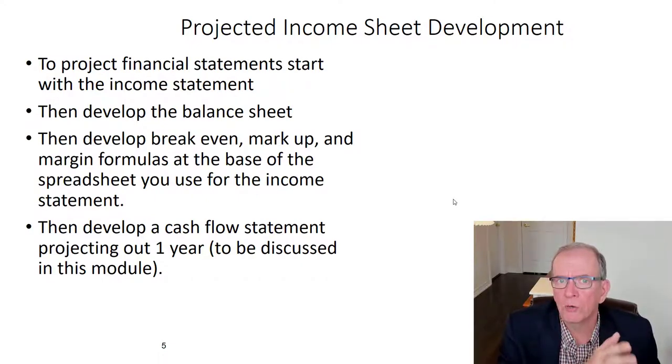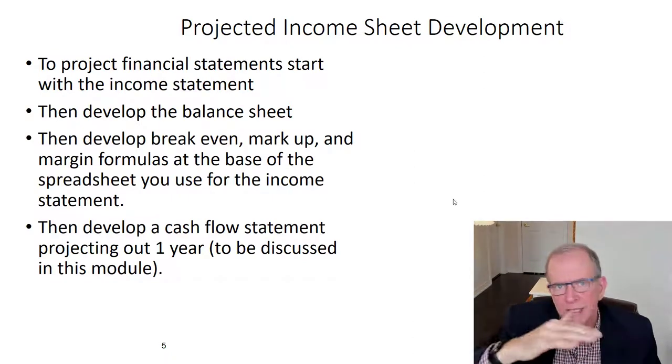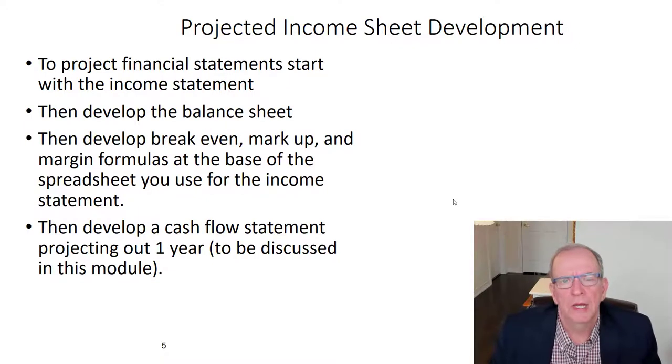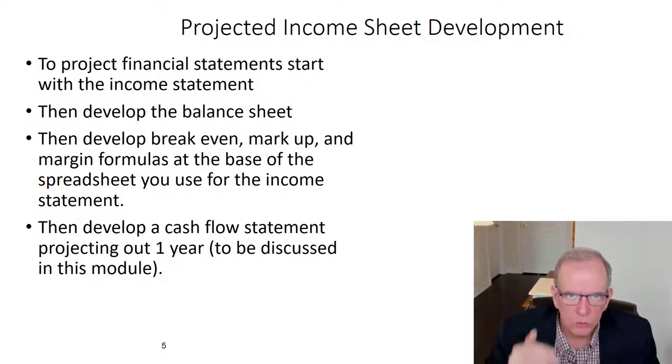We talked about overhead. You have to pay the rent every month. You have to pay the cell phone bill every month. You have to pay for the truck every month. Those ones are pretty steady and established, and you can break that up into monthly payments going forward over the next year. What's a lot more variable is your projects and the direct costs that are going out to your projects.